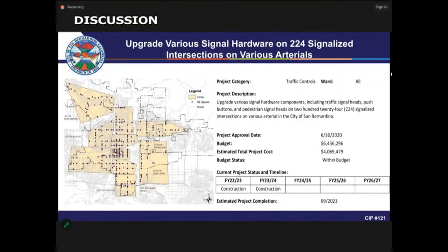So it looks like there's approximately $2.4 million. Yes, it's going to be excess in the grant fund amount, and we will have to get approval to spend that. Yes. Okay. Because as you can see, this one is actually 100% reimbursable. So when I get the invoicing, I prepare the invoice, send it to Caltrans, and they reimburse us for the full amount. Thank you. You're welcome.